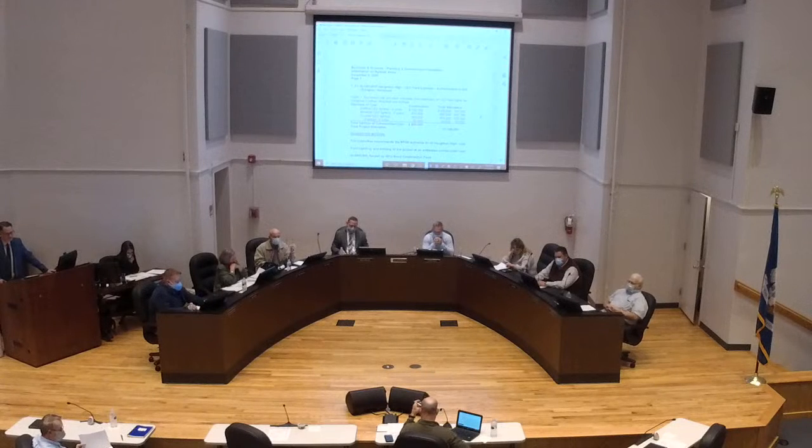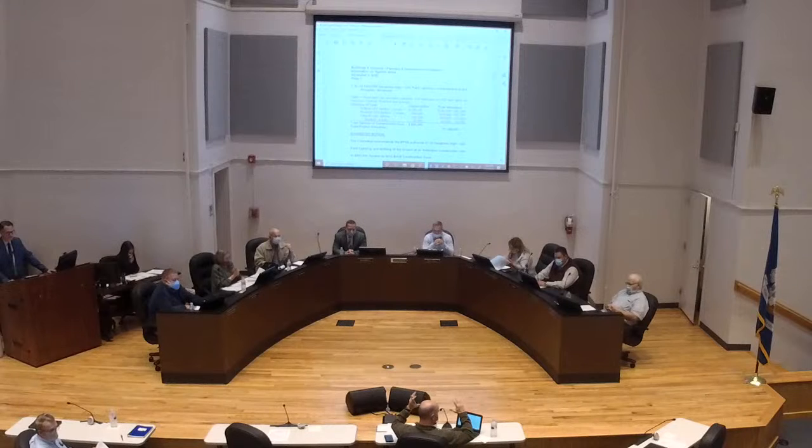Thank you, Madam Chairman. Are we replacing poles or just retrofitting the fixtures? What exactly is happening on softball, baseball, and football with poles? Are we replacing poles and the whole thing from top to bottom, or are we just retrofitting fixtures? We're removing all wood poles and replacing them with metal poles, proper heights, proper spacing for our lighting outputs, and light fixtures. That's for baseball and softball. We're replacing all pole lighting and poles, so they are up to code for safety measures.